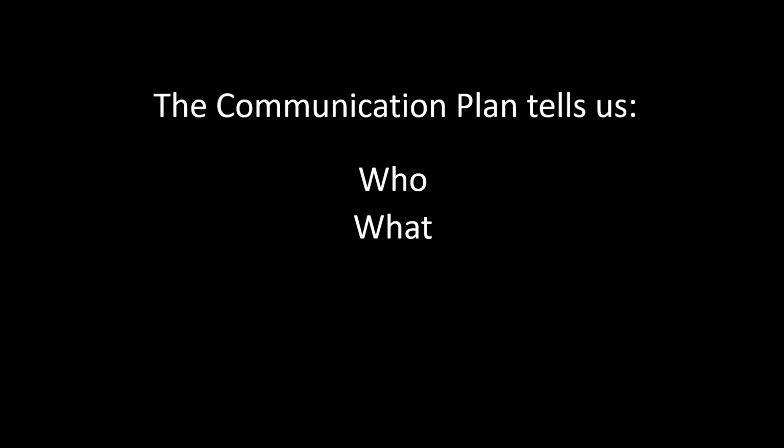So why are we telling them this information? What do we want them to do with it? Do we want them just to sit there and be happy and smile about it and say this is great, or do we want them to take some kind of action? And of course, the how are we communicating? And that's back to that previous screen that we saw, which might be a meeting, it might be a newsletter, it may be via a Skype call or some other kind of digital tool like that. It may be we just tell them in the break room over lunch or something like that. Okay, but we do need to know who, the what, the when, the why and the how.